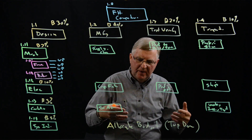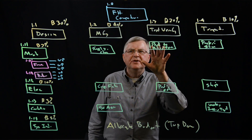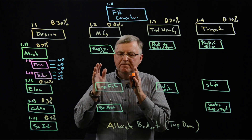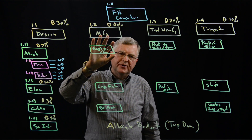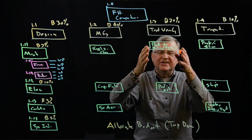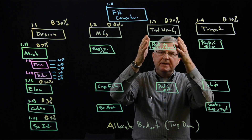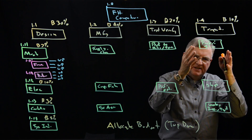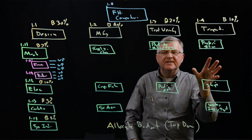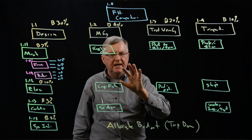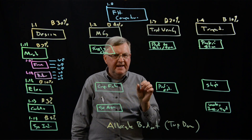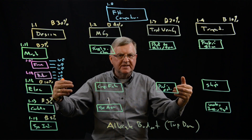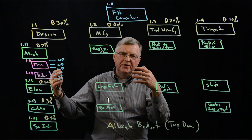Or the other alternative is to go out and raise more money. The work breakdown structure also lets us identify the types of skills we need: mechanical designers, machinists, material procurement people, testers for performance optimization, people familiar with formula hybrid rules for compliance, and experts in transporting sophisticated equipment. Most importantly, it ensures we identify all tasks that need to be completed, assigns budget to those tasks, and helps us track the budget during project execution.